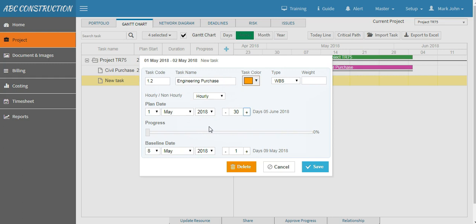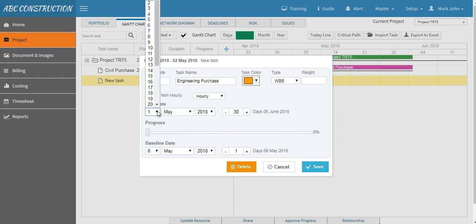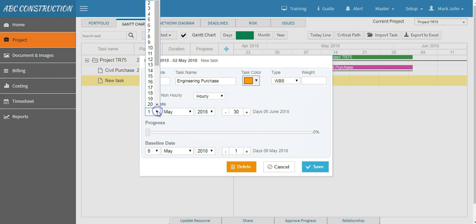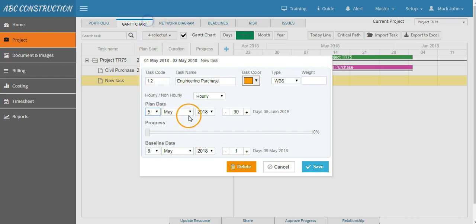Say we will start the Engineering Purchase after the completion of the Civil Purchase. And the Civil Purchase ends on fifth of June, so we will start our second task from fifth of June and save the task.